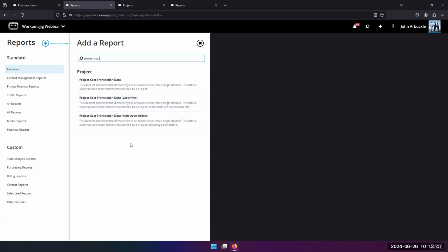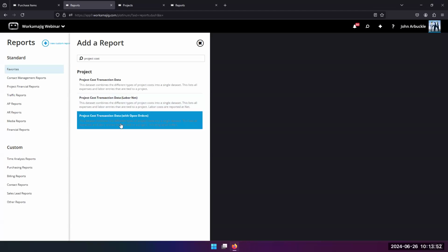Now, this one actually takes a transaction to show up. So again, I know I'm budgeting for that one. This one would not show that, because I'm not putting an actual time entry or an expense entry against my bulk item. Does that make sense? So it's not really a transaction against the project. So that's the difference in that one.